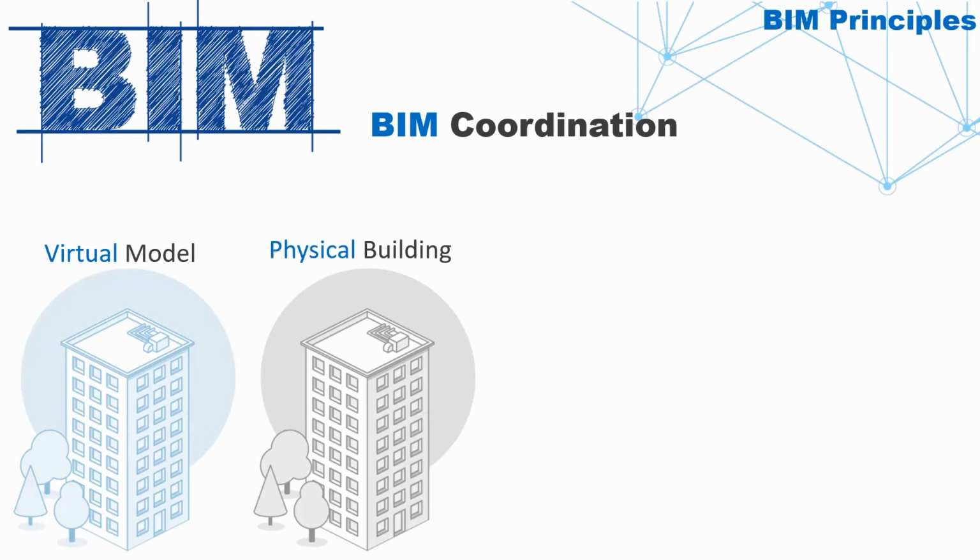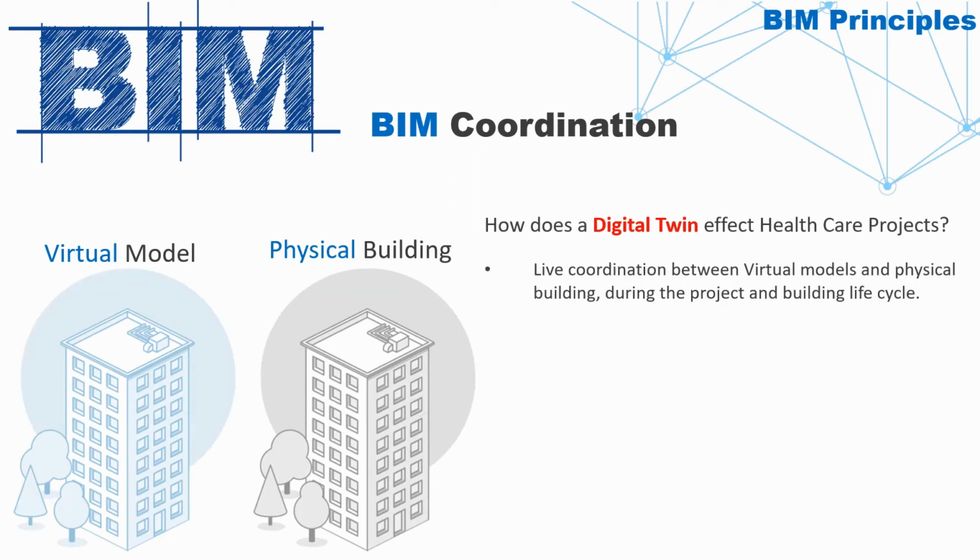What are the benefits of having such a digital twin? Well, better coordination. Teams can start coordinating live while they design. Visualizing 3D models is much easier and effective than coordinating in 2D plans. There is no need to imagine what a line represents when you can see the 3D object in that space and time. Since we deal with a digital twin, we can coordinate and predict clashes on site that can be resolved during the design phase. This already saves us time and money to reroute ducting, piping, and cable trays, or even rebuilding walls, redesigning rooms and spaces.